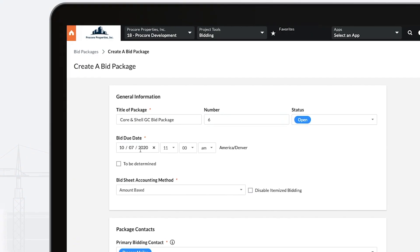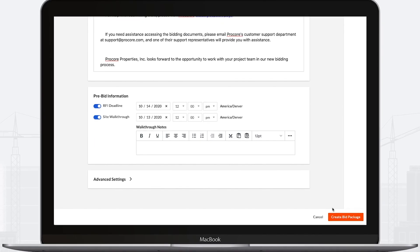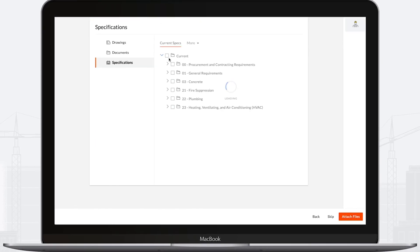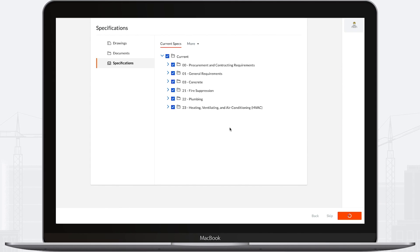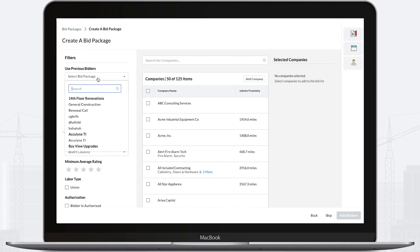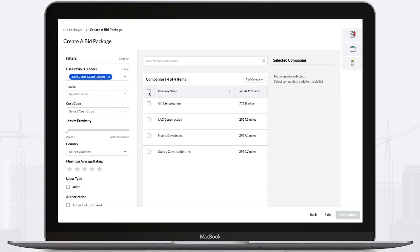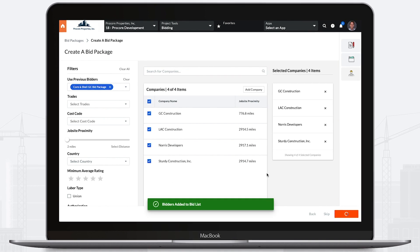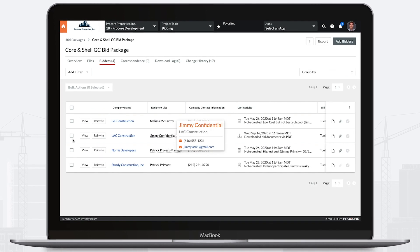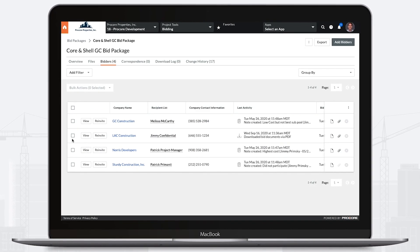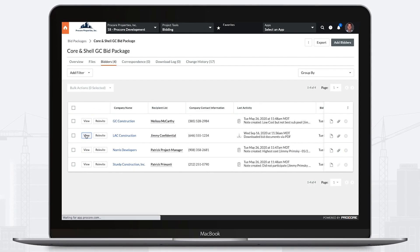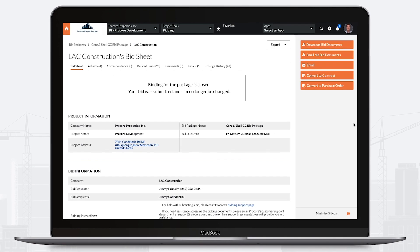Once you're ready to start bidding out work, use the bidding tool to consolidate, standardize, and streamline the bidding process. Leverage pre-existing data in Procore to seamlessly build bid packages and solicit bids from your preferred vendors with custom details and instruction. Then simply convert their bid to a contract.